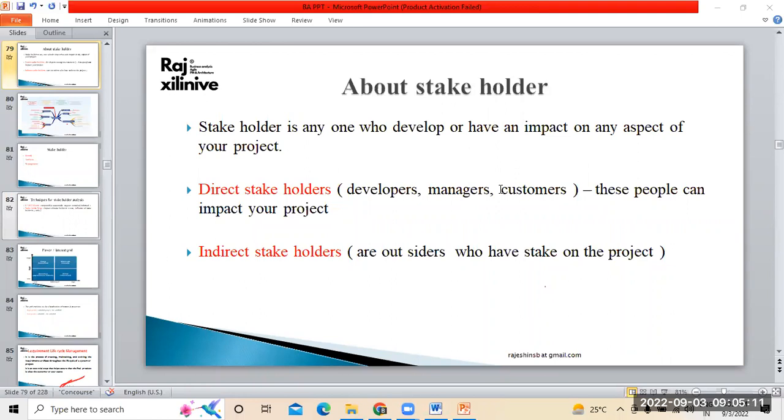Yes, the JAD session will be conducted whenever you start the project. We conduct the JAD session one time. Mostly we conduct it only once. A second time would be an add-on, right? Because we don't get an opportunity to interact with all the stakeholders at regular intervals, that's not practically possible all the time. So usually we conduct it one time, not more than that. Inviting all the people at the same time, with everybody attending, is possible only for one time. So we do it only for that.